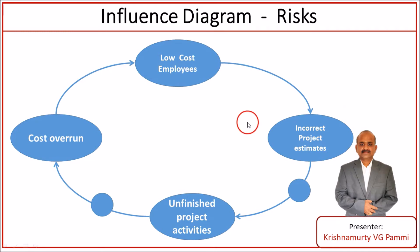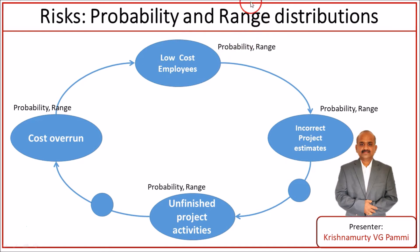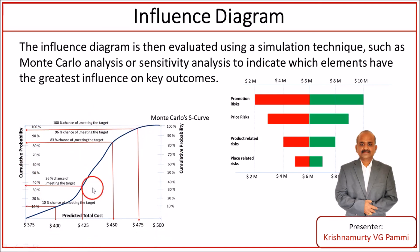This is the beauty of the influence diagram. It is a graphical representation of project events, entities, outcomes or risks, showing what influences them on a time scale so that variables and outcomes can better be analyzed by understanding their relationship. We can also provide probability and range estimates for each of the risks, and validate these using Monte Carlo analysis or sensitivity analysis using a tornado diagram, to understand the key risk involved and the net outcome on overall project objectives.